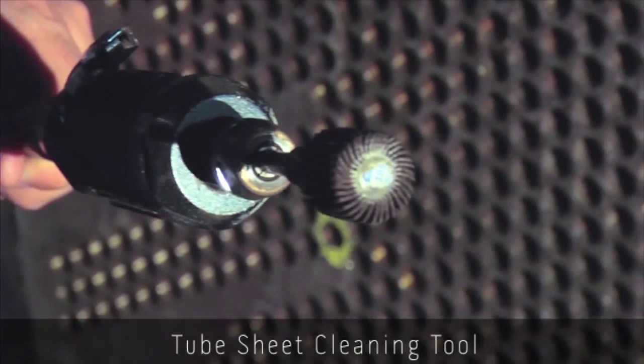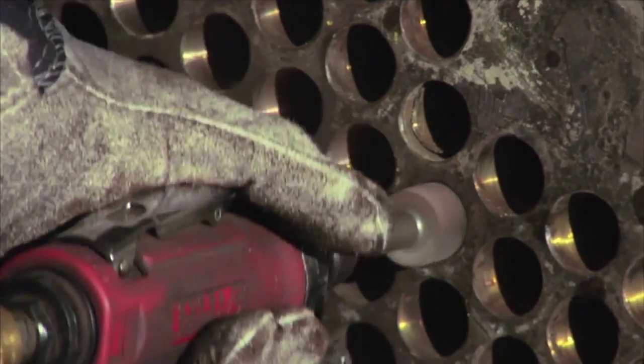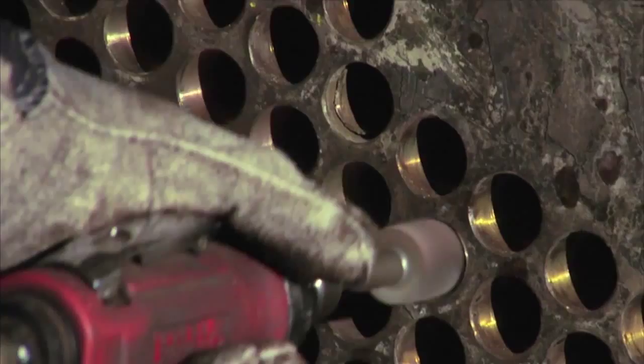After the tubes are out, we go in and we clean the support plates. All the support plate holes have to be cleaned to make sure any rust or anything that might be in the hole is taken out of it, so when we go to push the tubes, we don't have a problem. We go to the tube sheets on both ends and we clean them up and make sure we don't have any scratches or anything that would cause water to follow the scratch and cause a leak. And once that's all taken care of, we go in and we mic holes, normally every 100th hole. And so we have benchmarks as to what we're doing, where we're doing it, and so we know exactly how we're going to roll the tube.